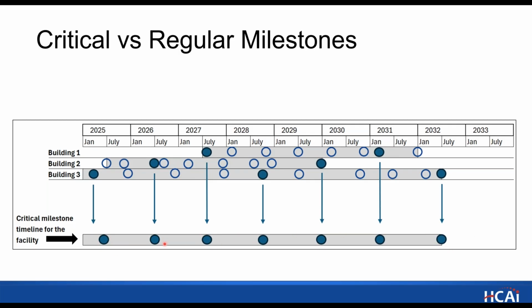If you start hitting all the critical milestones and achieving those, it in general shows that the facility is on track. What we advise is to choose these critical milestones for significant tasks, not, you know, a little canopy upgrade. So maybe a tower SPC upgrade coupled with, you know, a nursing wing, some NPC upgrades. Something significant so that it shows the big progress.